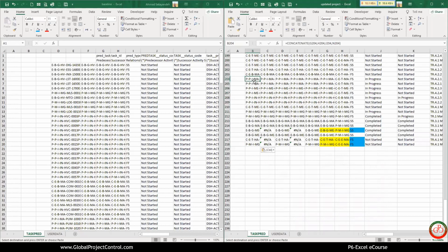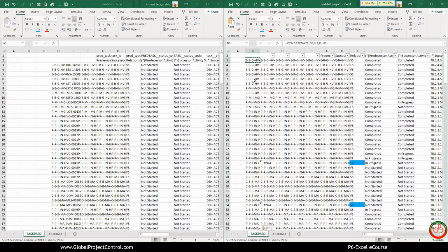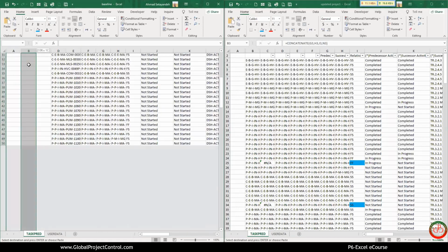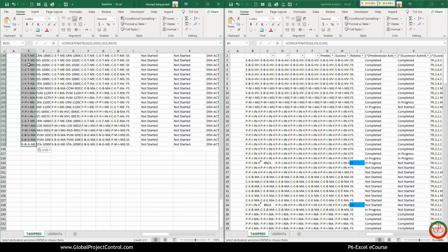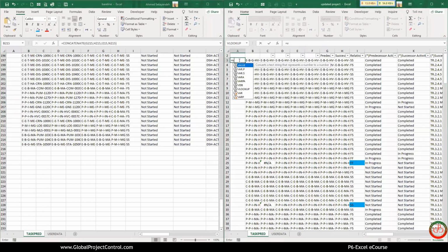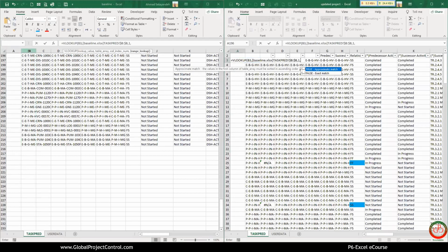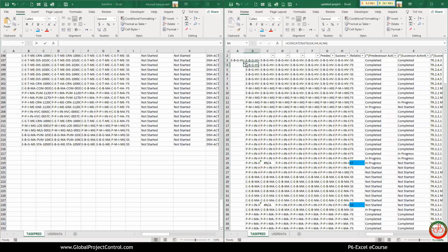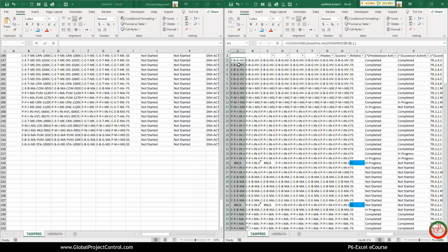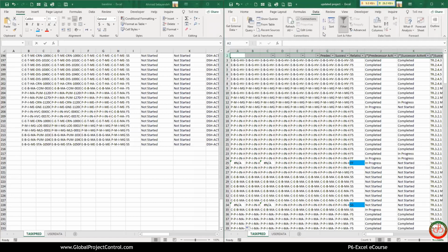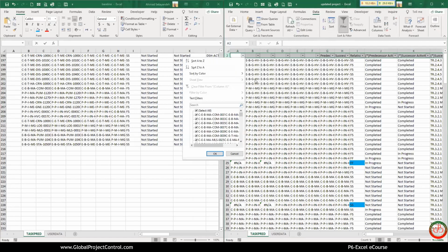Then you only need to copy this item and paste it over here. Copy this, go to the end one and paste the data. Again, I need to write an easy VLOOKUP. Then I have the list of tasks with discrepancy in comparison with the baseline.